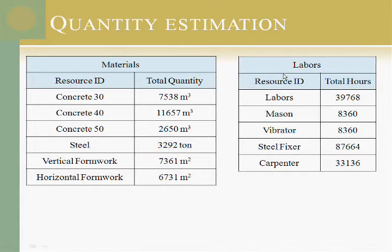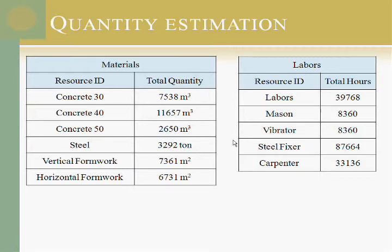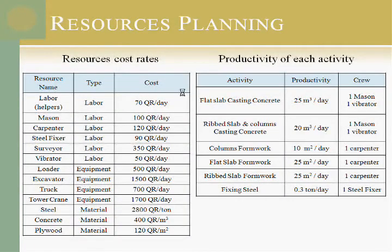For the quantity estimation, we calculated materials including around 7,500 m³ of concrete (C40 and C50), steel, vertical formwork, and horizontal formwork. For labor, we need masons, vibration operators, steel fixers, and carpenters. We only calculated labors and materials related to structural members, not architectural members or mechanical equipment. For resource planning, we assigned cost rates for each labor type and equipment including excavators, trucks, tower cranes, and steel, and we took the productivity of each activity.